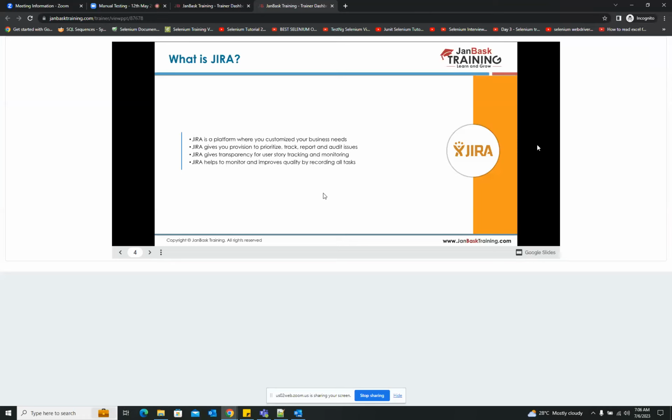Okay, so that is decided in the meeting. So it's individual and the team thing. If all the team members are going to work, or suppose you have a testing team of 6 members, but only 3 people are going to work on that particular story, then those 3 people will have a discussion and decide the story points. And finally it will be the product owner or the scrum master who will assign that story point to that particular story.